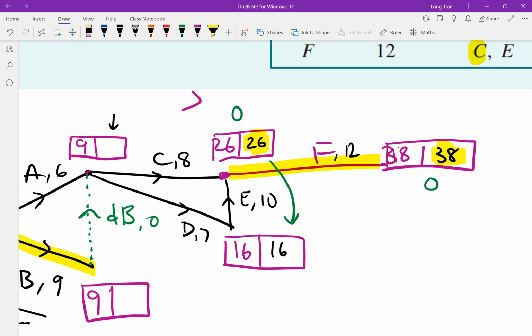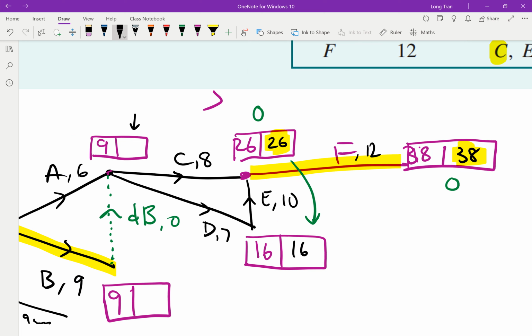But then if that's true, you can also work the other way around as well. You can say, well, 26, if I worked backwards, what's the latest start time for C? 26 take away 8 gives me 18. True? Yep, 18. But the problem is if I said the latest start time for C is 18, if I wrote 18 here, you can see a problem here.